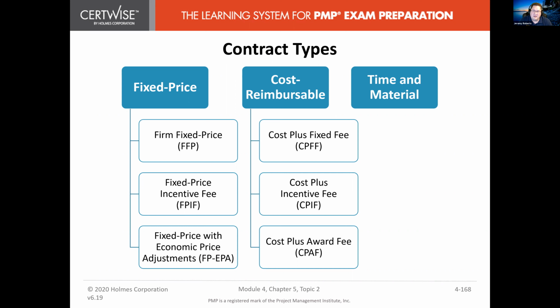So this one here is pretty common when, for example, leasing commercial space. You can lease a storefront, let's say $1,000 a month, but they have written into the contract that that price is going to go up 3% a year or whatever the cost of living increase is.